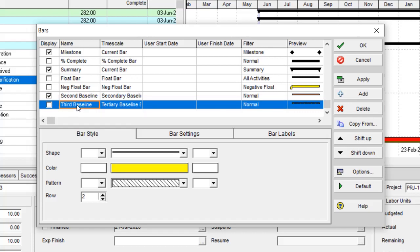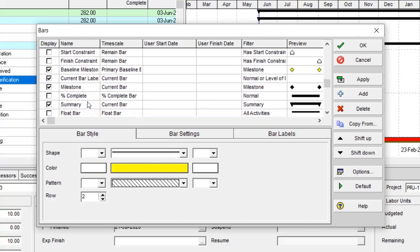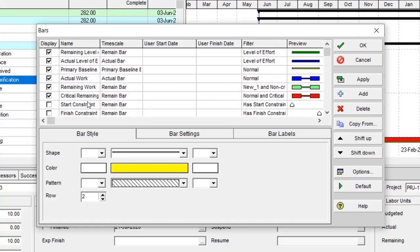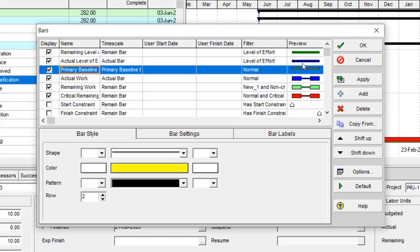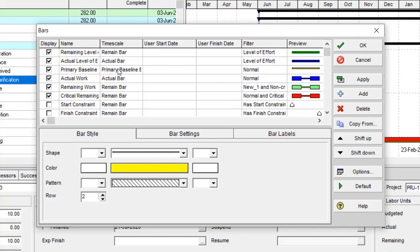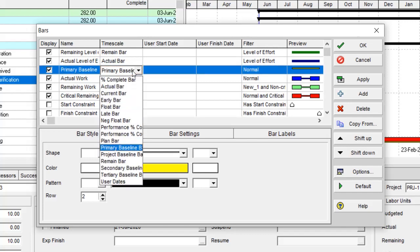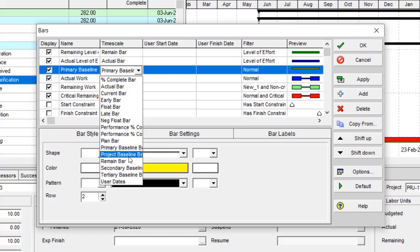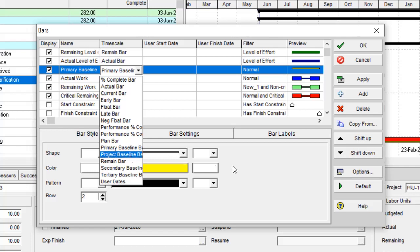But if you like to assign all four baselines over here, you need to create another Gantt chart for baselines. As you see, I have assigned this bar chart to the primary data. This is the secondary and this is the third. If I want to change it, I can select this over here and change the source from primary baseline to the project baseline.